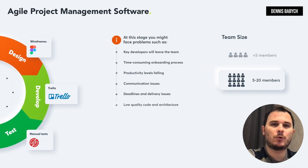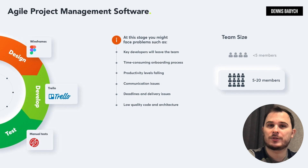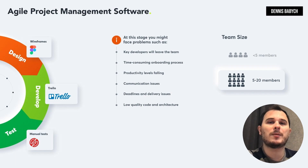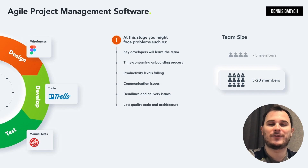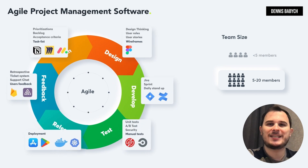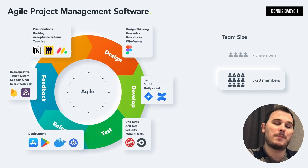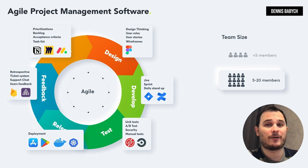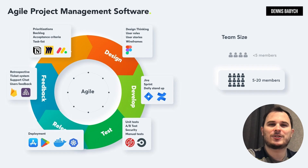To avoid these problems, it's important to hire a tech lead to oversee the team and code architecture, find a project manager with a tech background, implement scrum, sprints, backlog, and retrospective processes, conduct daily stand-ups to keep everyone updated on pending tasks, and utilize advanced tools like Jira to manage tasks and track your team velocity. Choosing the right tools at the appropriate stage can accelerate your progress toward achieving your MVP. Agile methodology can be a valuable asset not only in your software development journey, but also in your daily tasks, businesses, and marketing — it's a really powerful tool.